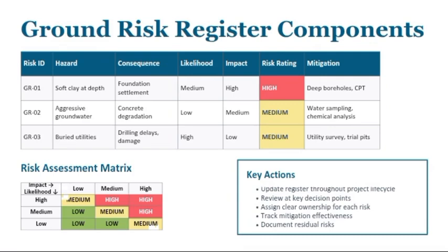Now observe the risk matrix. The matrix combines probability with consequences. Okay, same thing as impact and likelihood. Likelihood and impact for consequences, probability for likelihood. So for example, a low probability but catastrophic event may still receive a high risk rating, meaning that the probability of that thing occurring might be low, but the event is a very high risk one. It's a catastrophic event if it happens, so it can still receive a high risk rating. But something frequent, that can come up every now and then, but is a minor issue, might actually receive a moderate risk.